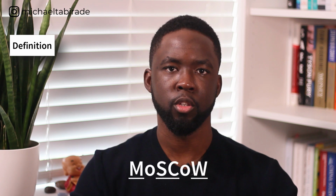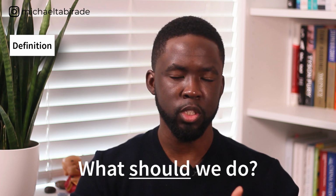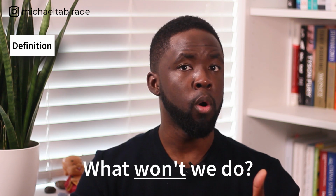Now, there's one neat framework that you can use to help you think about what is in scope and what is out of scope. And this is known as the Moscow method. And Moscow really defines what must we do, what should we do, what could we do, and what we won't do. Okay.